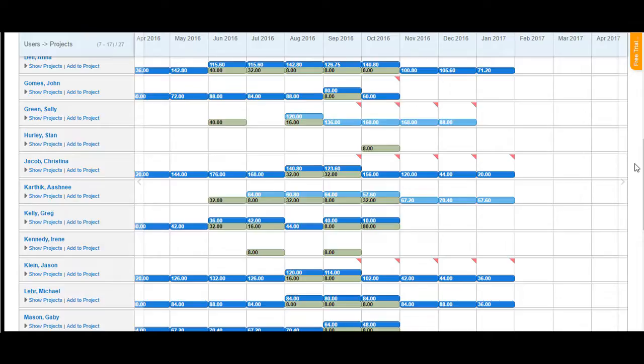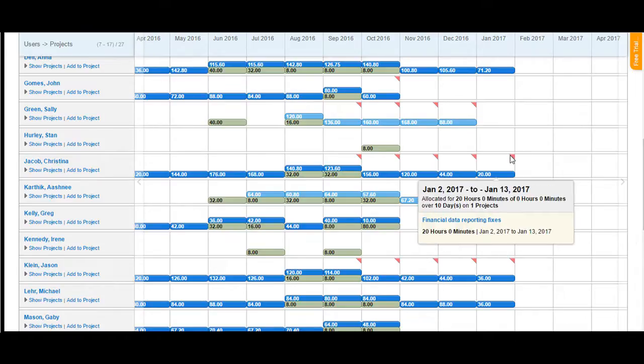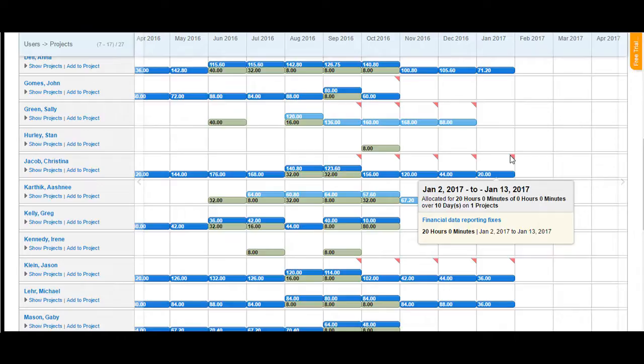You can also see a red color triangle available at the top right hand corner for some of the cells. These right hand side triangles specify that the user has been overly allocated. That is, the user was specified to work for a number of hours but has been working or has been allocated for a larger number of hours here.